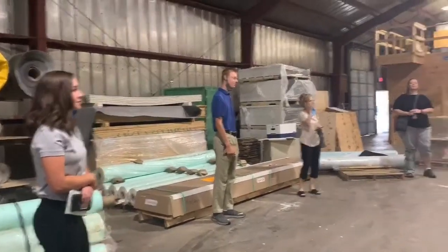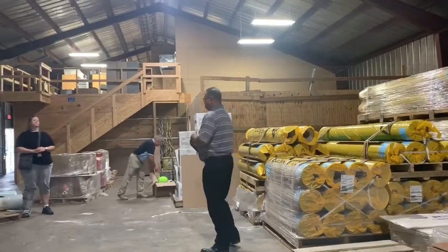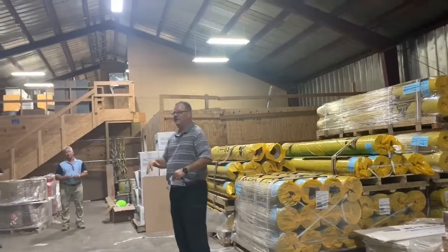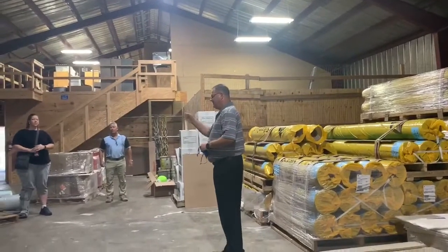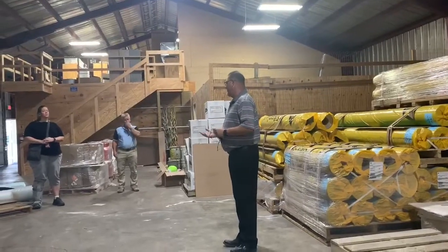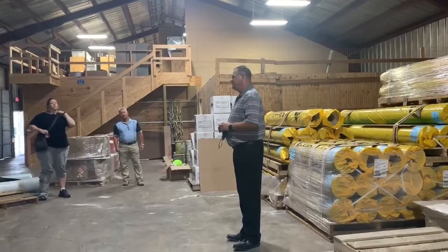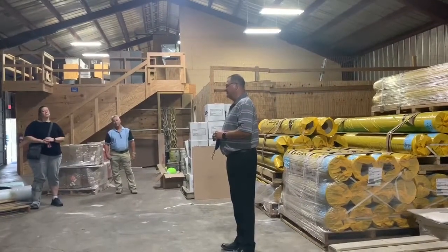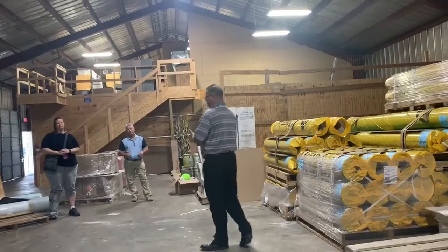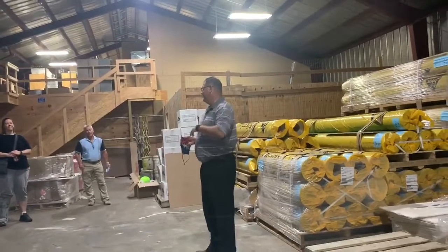This is our roofing warehouse. And again, the business has changed over the years. Years ago, we used to take all of our material for jobs into this warehouse and then repackage it on the trucks to go out to separate job sites. Now everything is drop shipped to the job site primarily. For example, we just picked up a job in North Carolina that has 260 trucks of insulation. So just the logistics of handling 260 semi-trucks of insulation like this. That doesn't include the membrane of that.